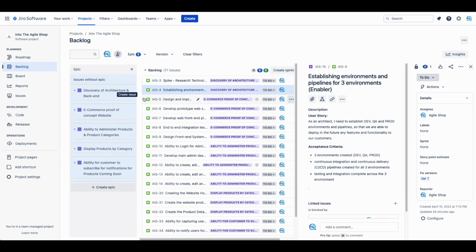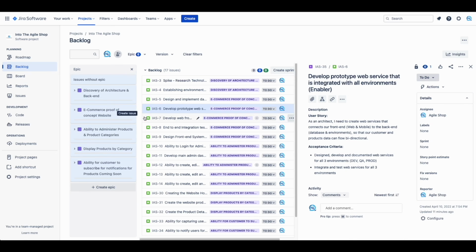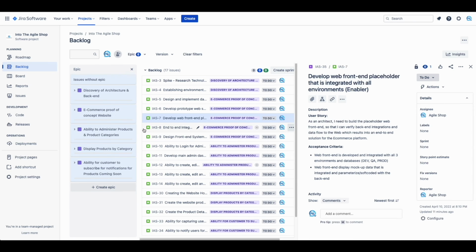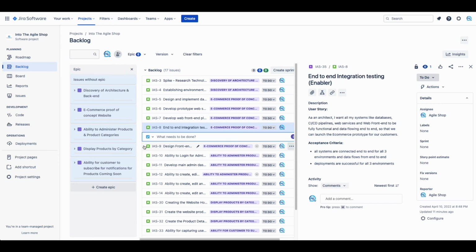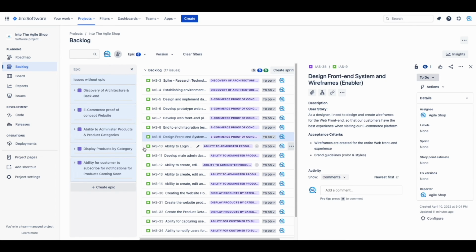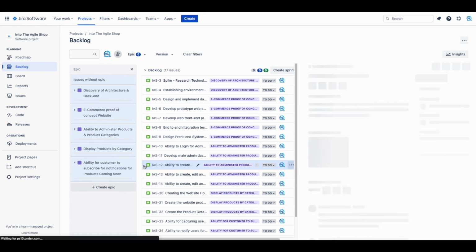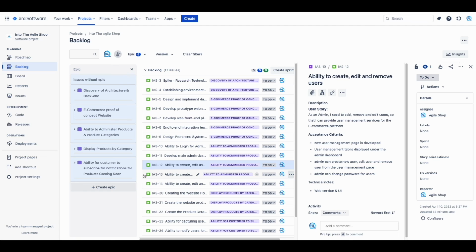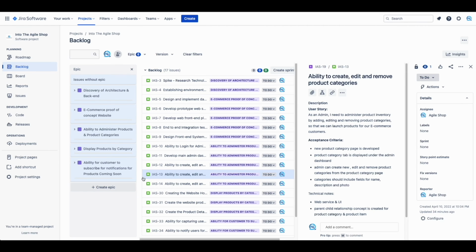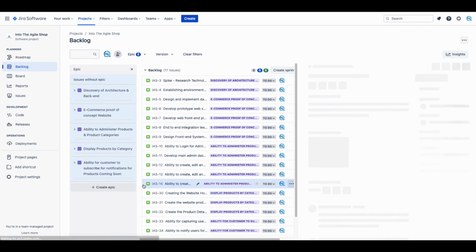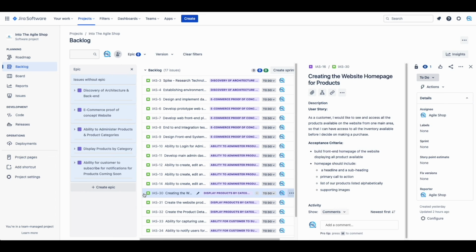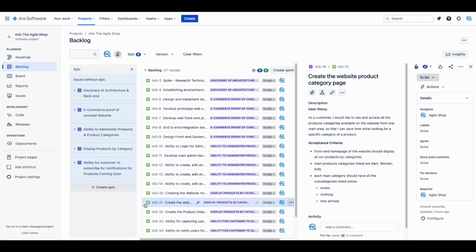You will notice most of the user stories under the first 2 epics are listed as enablers. An enabler is a story that is not delivering business value on its own right away. Instead, it enables the team to deliver the value in future iterations, building on top of the outcome of the enabler story. It's common that at the beginning of any big platform creation or project in general, some of the architecture and technical infrastructure needs to be built first. These types of user stories are referred to as enablers.